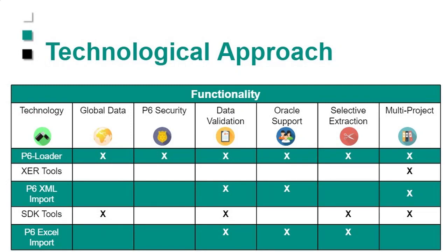Your security model is fully supported. So a user who can only update one project in P6 can only update that same project through P6-Loader. All of the data is validated, and you'll get messages telling you what the problem is if it doesn't work. It's supported completely by Oracle. In fact, Oracle sells P6-Loader on their Oracle Cloud marketplace. You can select what you extract and what you load, and you can upload and download as many projects and baselines, for that matter, as you want to. So it kind of gives you the best of all worlds.